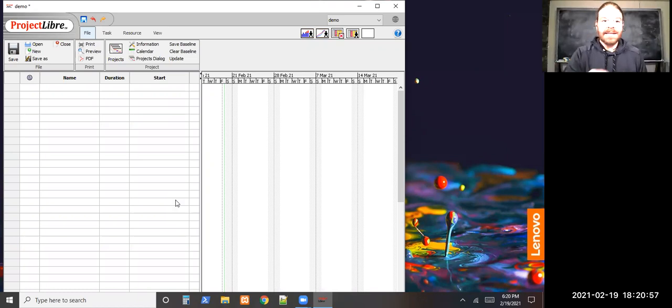So you'll see something that looks like this. By default, we have sort of a spreadsheet table looking thing on one side and the schedule stuff, and we can start filling this in. So what have we done so far? Proposal. Then here it's saying that's expected to take 1 day, change that, maybe that's a 4-day process. And we can fill in different things, requirements.